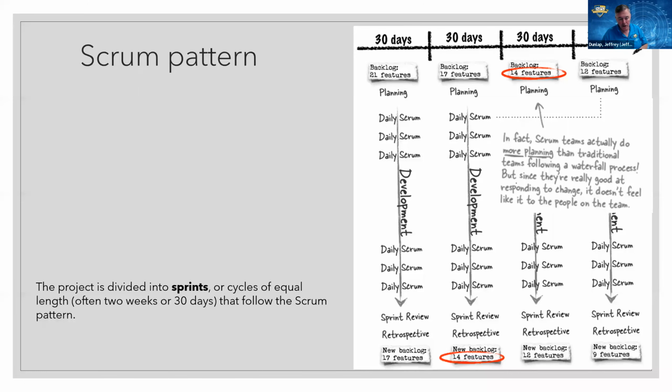One thing I will caution you from a team perspective, don't do too much hard stuff during the first couple sprints, right? The user may say, I need these things tomorrow. It's like, yeah, but those are really hard. Let me spread this out. I'll commit to giving them to you within the year, but I've got to make sure that my team is able to be successful as we work through this and have a mix of easy and hard stuff as we go through. Does that make sense?